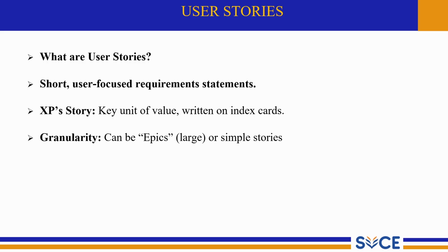A short user focused requirement statement. User stories are usually short and written in plain language. They capture what the user wants in one sentence. For example, as a customer, I want to reset my password so that I can recover my account. This format keeps the team focused on user needs.